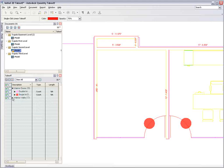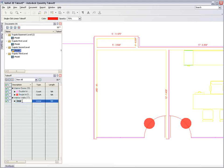For example, you may wish to calculate the number of studs and gypsum boards required for each section of a wall and the total number for the project, all of which can easily be calculated from the takeoff itself.